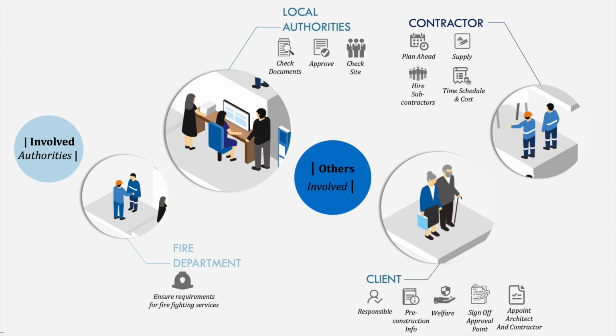A contractor is responsible for all the legal and regulatory requirements. This means that the contractor has to obtain all necessary permits before proceeding to start the project. Lastly, the contractor has a safety policy to ensure health and safety at the site. The contractor is also required to carry out remedial work under DLP, which is the defect liability period.